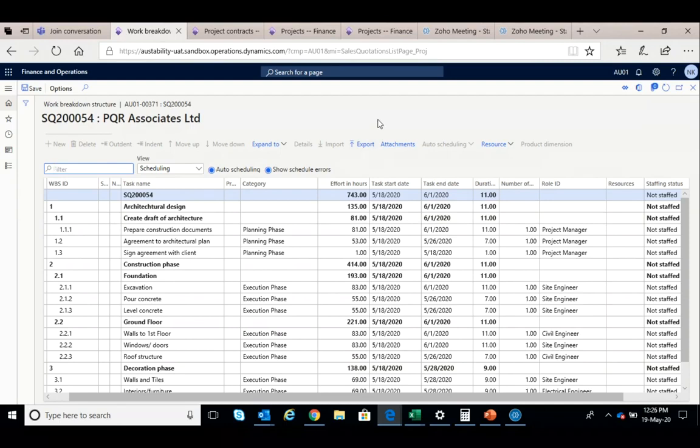So they all are roles in the project, and they have associated costs. There is a cost and there is a corresponding selling price also. For example, the cost could be $100 per hour and the selling price could be $120 per hour. There are certain companies which cannot give a line-wise selling price. No need for line-wise selling price; then we can still put a consolidated revenue.